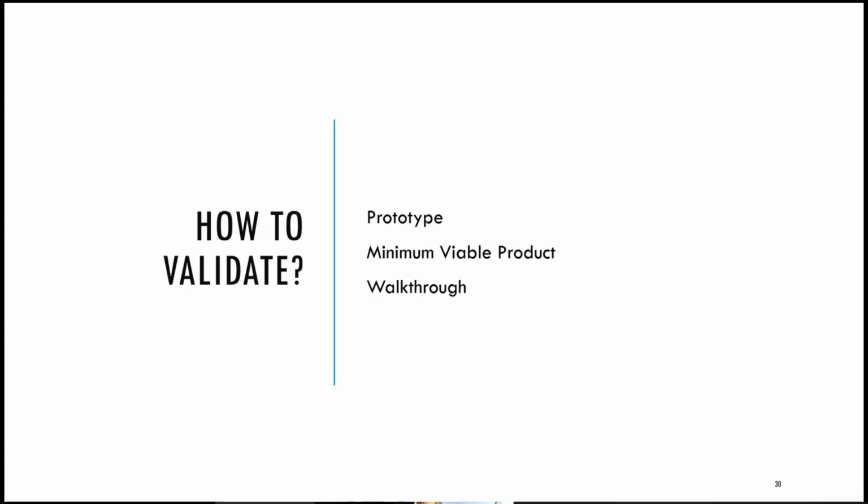You can build a prototype. The stakeholder can then react and specify if something is missing or give positive feedback if it's meeting their vision. In an Agile project, the minimum viable product is used. In specific sprints, the stakeholder can test and see how far the engineering has gone and give them feedback if the project is on the right track or not. But we can also work with the documentation we have, especially in waterfall with the requirement specification.